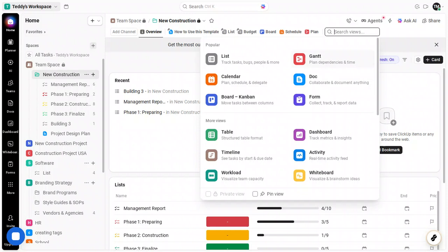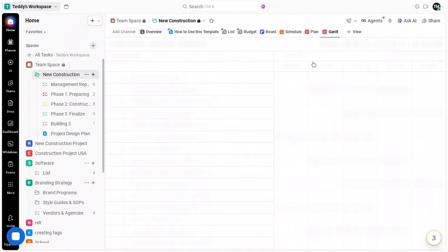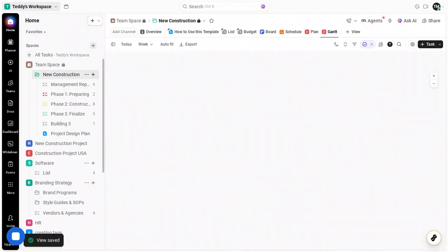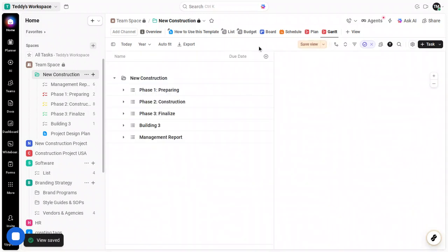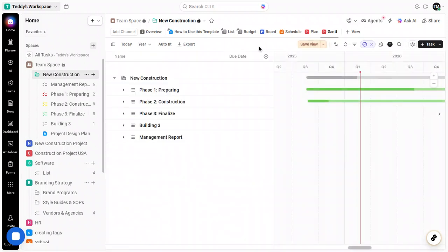Now look closely at the timeline. This is where the real planning happens. Each bar represents a task, and its length shows the duration. At the ends of those bars, you'll notice small handles, often shown as dots or little grips. Click a handle to select it. You can drag these to adjust how tasks relate to each other, or to fine-tune where the work starts and ends. If your due dates need an update, simply drag the right edge of a bar to extend or shorten the duration. As you do this, the task's due date updates immediately, keeping your plan in sync with reality.